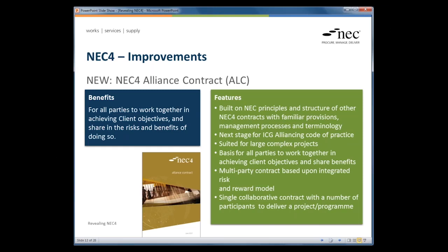Yeah, the key point about this is that we're trying to set up an integrated team. The individual organisations involved do not get a benefit according to how they perform. They get a benefit according to how the whole team performs. So people are motivated to produce work using the best means possible rather than producing work for themselves to get profit out of it. The profit will come from achieving clients' requirements, and they are best done by using the most appropriate resources. So the team should be working together to achieve these.